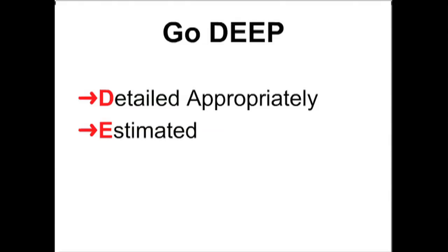So this is another important concept that we practice, and this is estimating the stories. There are many reasons why we do this. One, we get a sense of how big the stories are when we use story points against it. So we have a product backlog. We have it prioritized, but part of the prioritization we do against it is having it estimated first. So we figure out in story points how big relatively is this user story. And that helps us to figure out where it should go in the priority list. Should we break it up?